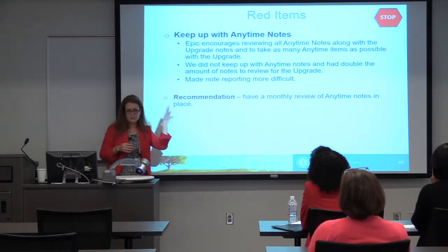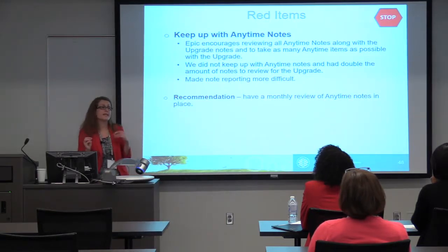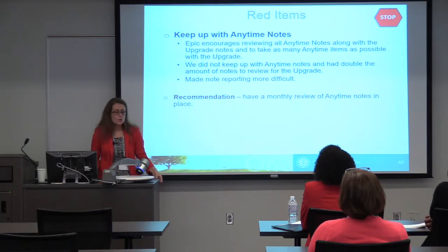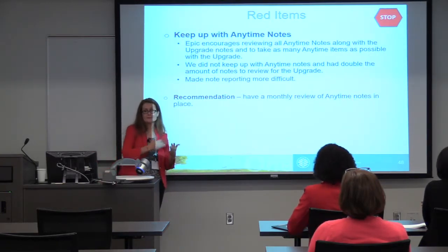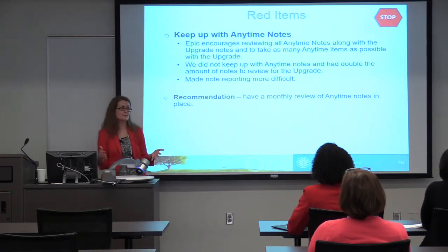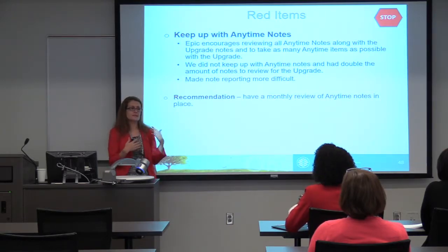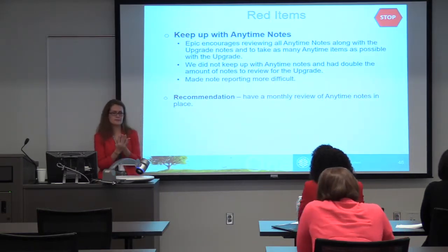That's one piece. They also have what they call anytime notes, where you can take that functionality at any time. You don't have to wait for your upgrade. You can take it whenever you want it. We didn't review those anytime notes leading up to our upgrade because we were so busy working on our implementation go live. Epic really encourages you to review the anytime notes as well as your upgrade notes so that you can take as much functionality as possible into the upgrade.